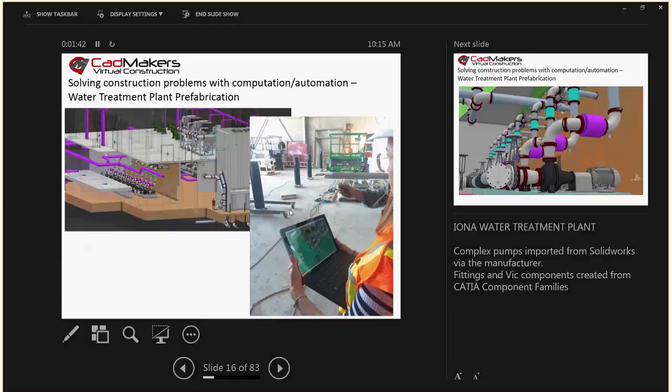Yeah, regarding information for fabrication, for Tall Wood we just provided a STEP file, and that's all the fabricator really needed to generate the G-code. With respect to mechanical, the people we work with aren't necessarily advanced in their technologies in all cases, so we provided a 2D output, just some drawings like we showed earlier.